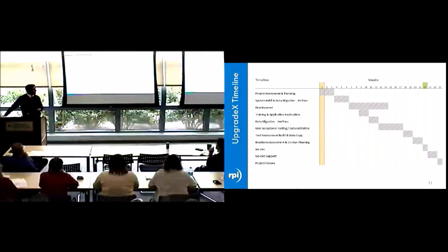From there, usually between user acceptance and go-live, we will move data into your test environment so that it's there prior to cutover. We'll do a formal readiness assessment, which starts with a good review and sign-off of test plan results, making sure all appropriate communications have occurred. And finally go live itself, which hopefully at that point is kind of a non-event. So it's probably not too different than an on-prem upgrade, but that's essentially our methodology.